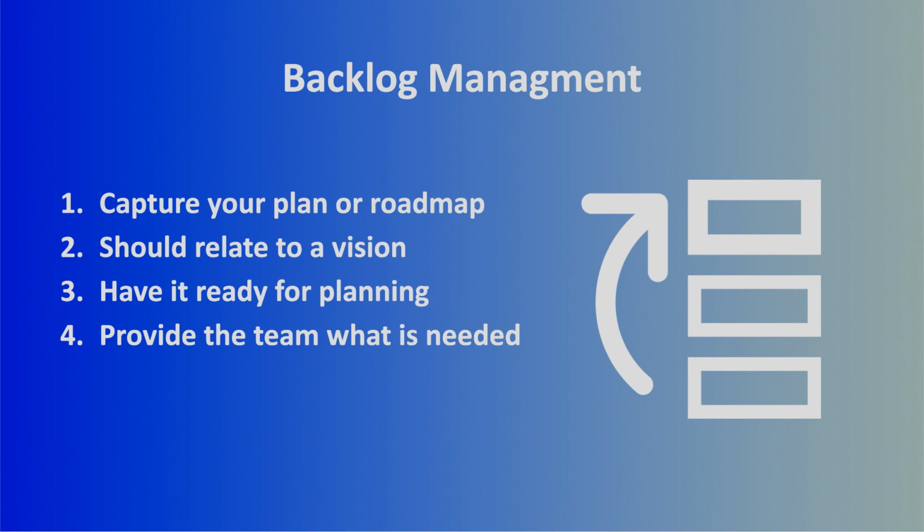So you should try to figure out everything that the team needs from you as a product owner and make sure you're putting that into your backlog. And the last thing worth mentioning on backlog management is acceptance criteria, right? You want to have that who, what, and why, and then you want to have the items that are needed to be complete for you to consider this piece of work done. That's a really important piece of information for your team, and it's going to help them really scope out the work in that story card.